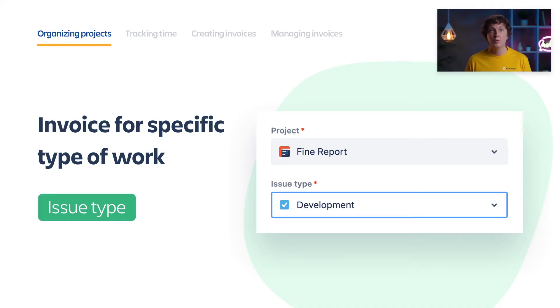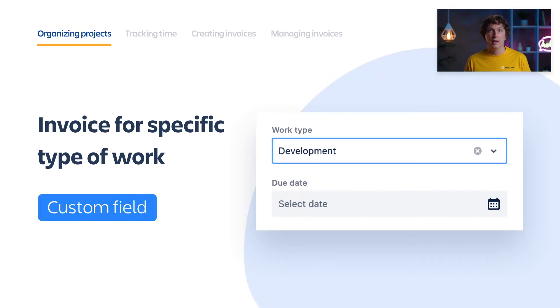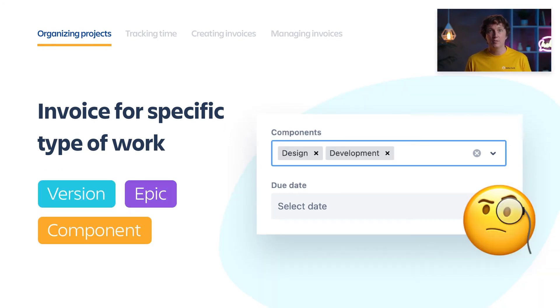Sometimes you need to use different rates for different types of work regardless of who worked on the task — for example, if people frequently switch between roles. Our lead developer may do both development, automated QA, and project management. Or another example: we charge all team meetings at a flat rate. The best option here is to use issue types — simply create a separate issue type for each work type. Another option is to use a custom field. Using epics, versions, or components is not the best idea since they exist inside one project only and sometimes allow multiple selections.